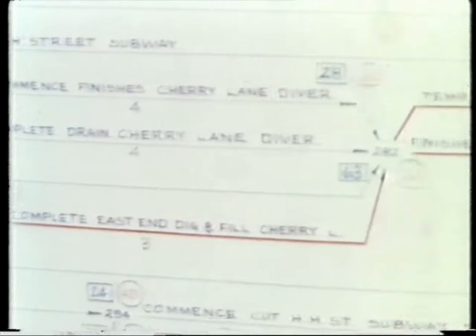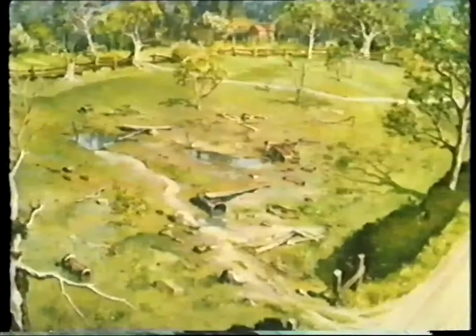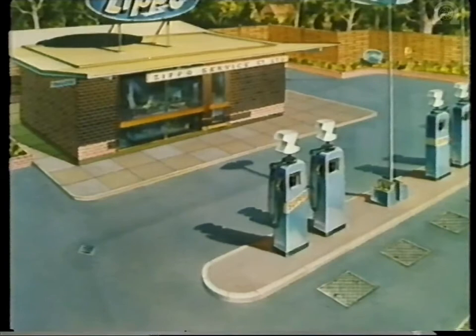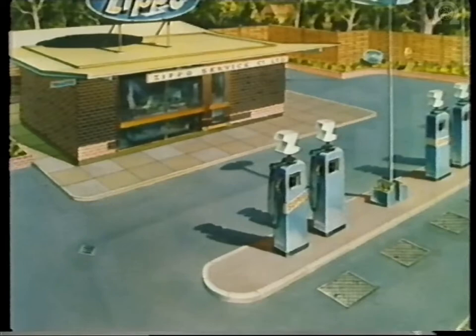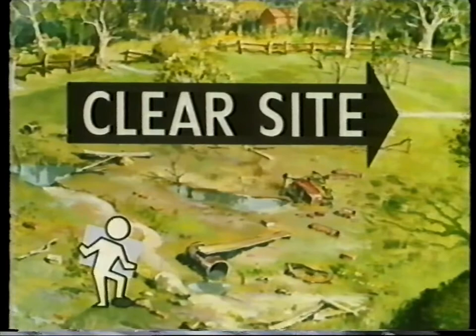Whilst a critical path diagram can be complicated, the principles can be explained by looking at a simple example. This is the site and this is the project. It has to be ready in 40 working days in time for the August bank holiday rush. To start at the beginning: first, the site has to be cleared. The time this will take must be estimated on the basis of previous experience. It will be agreed by the planner and the foreman or the agent who will be in charge of the project.